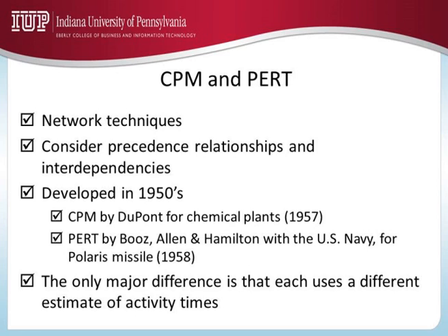Most likely is the second estimate, which may take 21 days. The third estimate is the pessimistic estimate. This is when Murphy's law plays a role: everything that can go wrong will go wrong. If that happens, then the excavation and foundation may take 30 days.